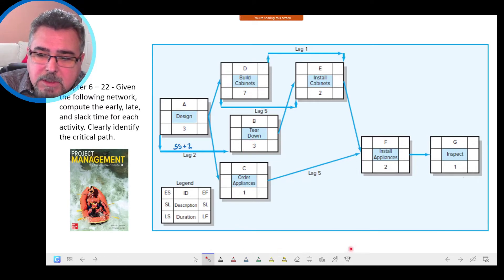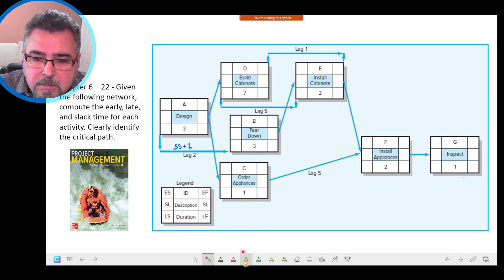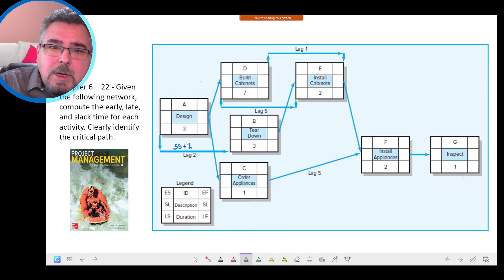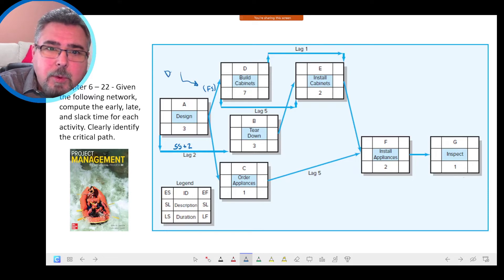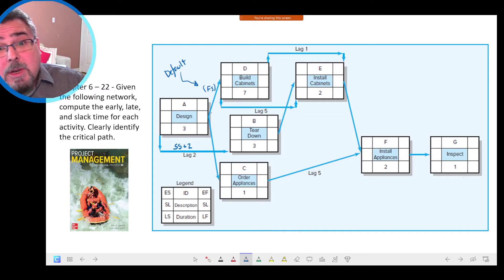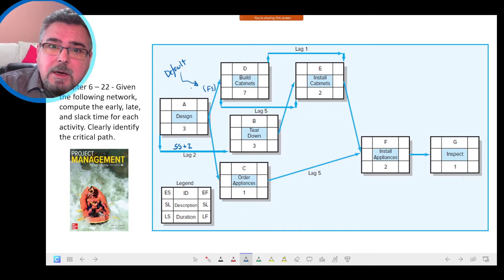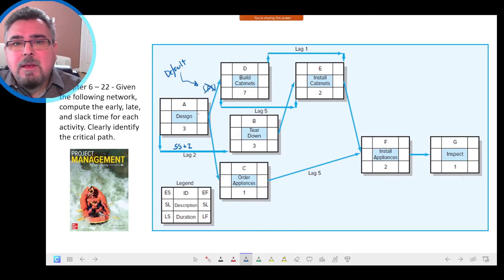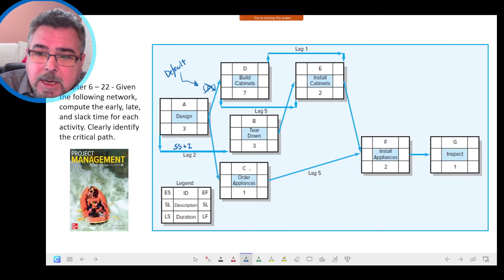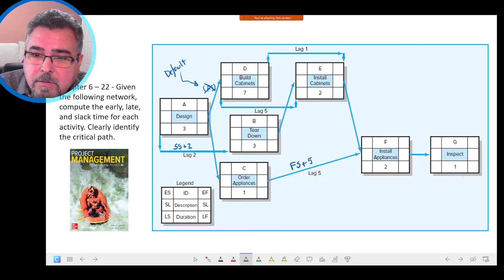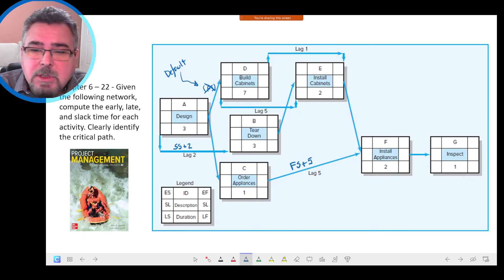Let's see the other activities. For that one over here, it is Finish-to-Start. Finish-to-Start — we don't need to put that symbol because it's the default relationship. Usually you won't see anything; it means Finish-to-Start. Unless you have a lag, like here between Activity C and F — that one is Finish-to-Start plus 5.